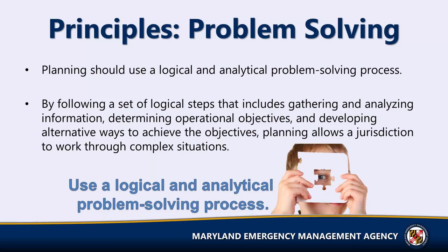Planning should use a logical and analytical problem-solving process to help address the complexity and uncertainty inherent in responding to potential threats and hazards. By following a set of logical steps that includes gathering and analyzing information, determining operational objectives, and developing alternative ways to achieve the objectives, planning allows a jurisdiction to work through complex situations.